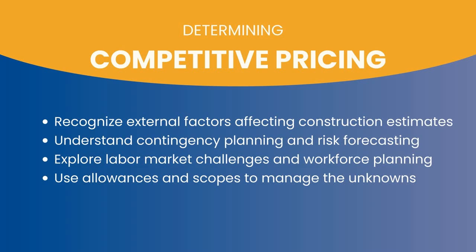I don't know how much, but if I have that unit cost list attached to the contract, and I can guess that there might be about 200 square feet of dry rot, then I can come up with a dollar amount that includes labor, material, and equipment necessary for me to replace 200 square feet of dry rot if it is found. And in that moment, the owner has a comfortability of knowing that that still falls within the amount of money that they have available to complete this project.